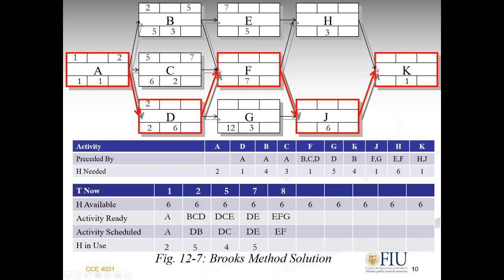Then with E, what's the next priority between E, F, G? F definitely comes before G because F and G haven't started yet at all. So you see, when we check priority, make sure that none of these has started. If any one of these started already, you have to move that here to continue. So E will have day 8 now, but it has 7, I will leave it at 7. F, I will give it day 8.